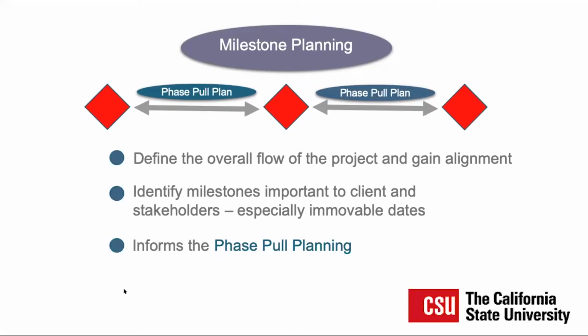But the idea is you take those 7 different schedules, or however many they are, and you have a common view and understanding of how everyone is going to do their work. And then as part of that, there are important milestones, not only for the project, but these really kind of drive it. So we're looking at our milestones here. These are pretty typical important things, whether it be weathered in, it could be out of the ground, it could be topped off, and various types of things.